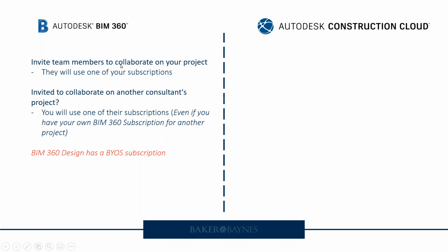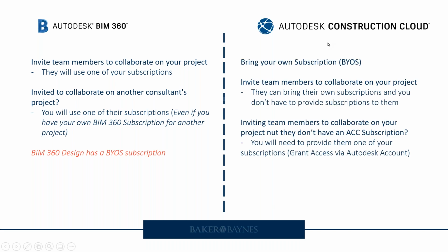This is the case for BIM 360 Docs, not the case for BIM 360 Design that has a bring your own subscription option, which I'll touch on in a little bit. So remember, BIM 360 Docs, if you invite someone, they use one of your, or out of your pool of licenses. When we look at Autodesk Construction Cloud or then Autodesk Docs and some of the other Construction Cloud applications, it all has a bring your own subscription offer.